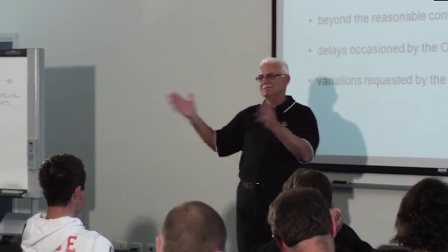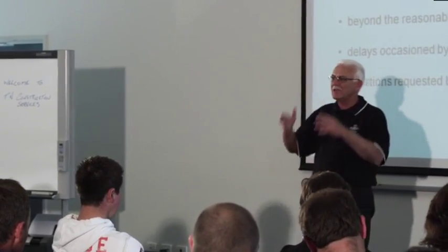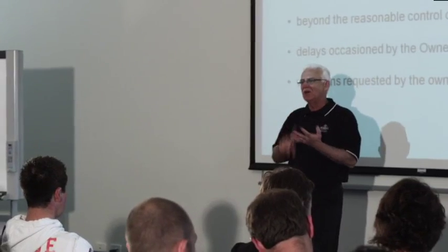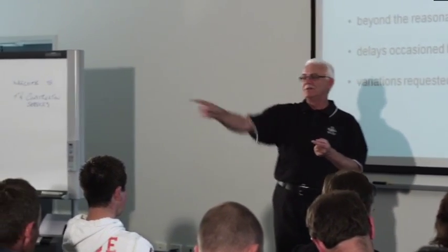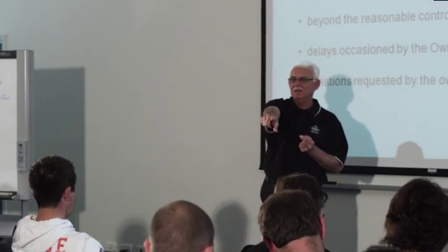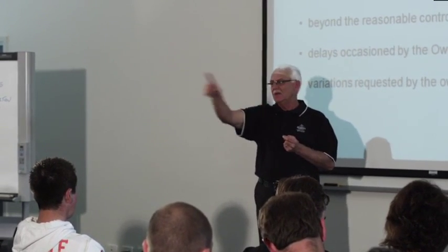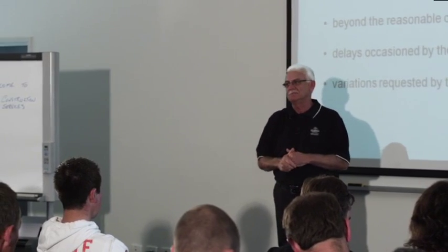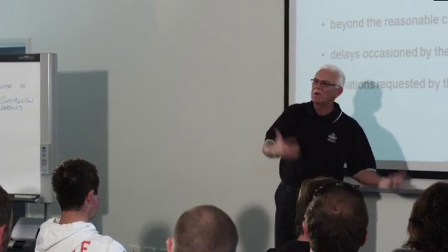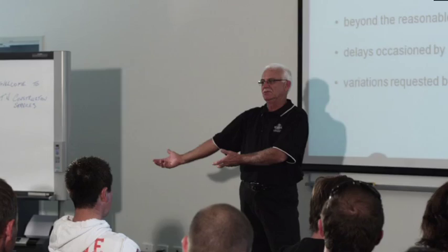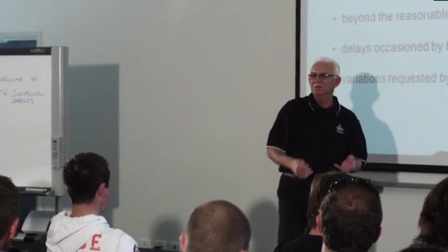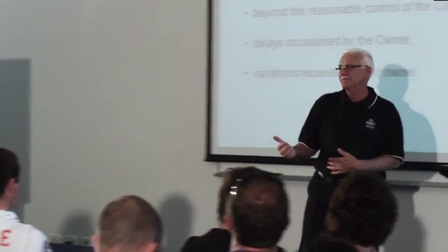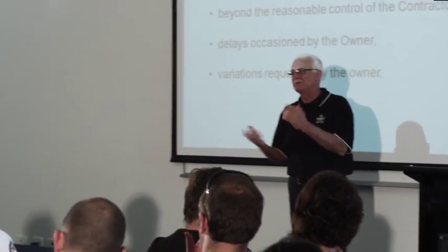That's for accountants to work out. But you are entitled to get paid for overdue payment. So not only will a judge in this case say, owner, you're wrong, pay the builder, but pay him 10% interest on the amount overdue for the last 6 months. So there is a way where the contract has actually benefited you, that it's helped you get through any problems that you had. You're entitled to that. Why wouldn't you be?